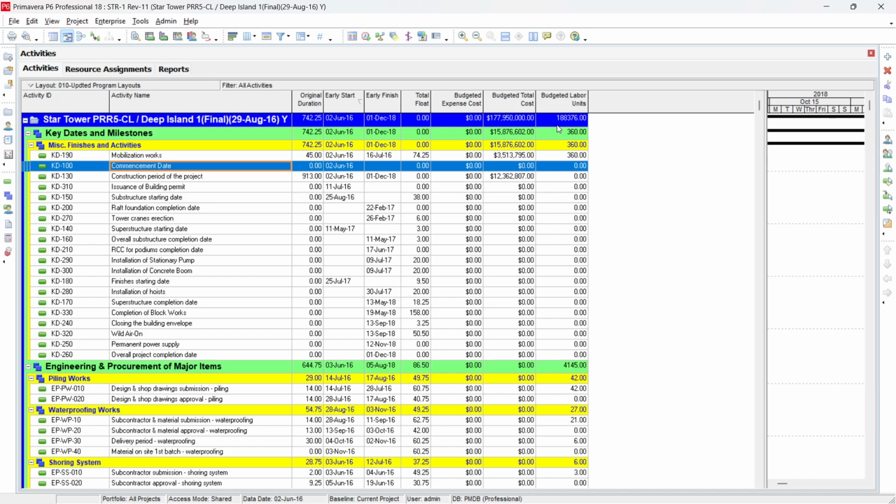When you are converting the BOQ cost from expense to resources, have a look, because sometimes some values are not copied properly. So before importing the Excel file back into Primavera, check manually using Excel that our values are coming correctly, because sometimes I find when updating that some values are there, but they do not come in when we are importing. Similarly, when making the budgeted units equal to the budgeted cost, I found that in this project the expense cost was not converted properly into budgeted units.